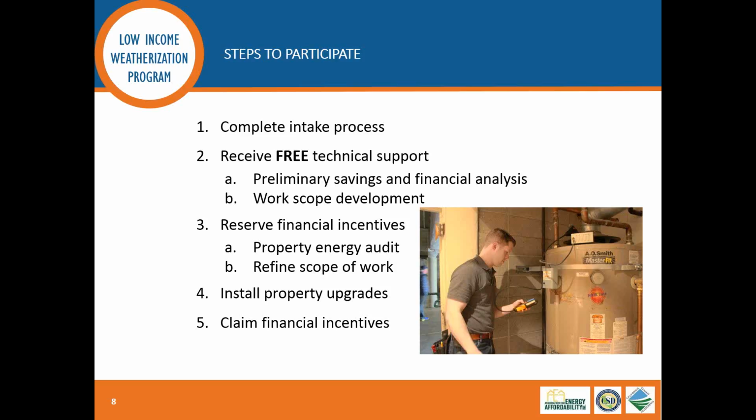At that point in time, we would provide the owner with the minimum requirements for all the measures that they want to have installed. And then the owner is in charge from that point, and we're just providing support and assistance. So if the owner has a GC or contractors that they've worked with in the past, they can reach out to them directly and have those contractors provide proposals to the building owner to do that work. But very often, a lot of these properties have procurement requirements that require multiple proposals, or they just want to get multiple proposals, because it's in their best interest.